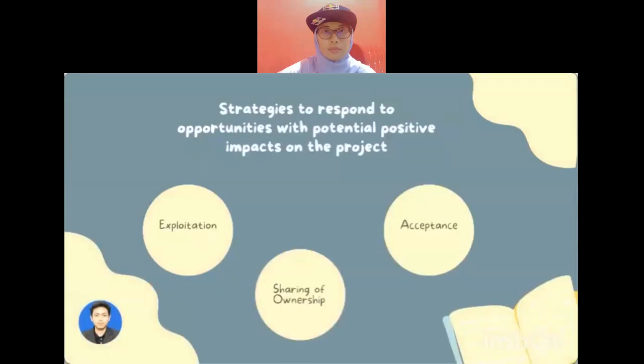The first one is exploitation. This strategy attempts to take advantage of the situation to ensure that the opportunity is realized. For example, a project team may take advantage of a new system, development methodology, or tool to reduce development time or cost, or to improve the overall quality of the system, product, or service.